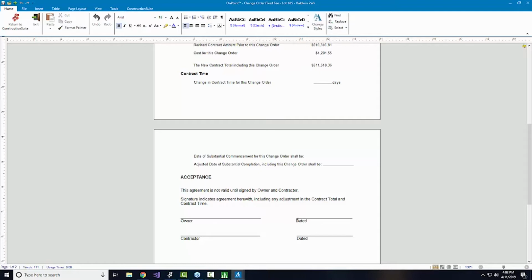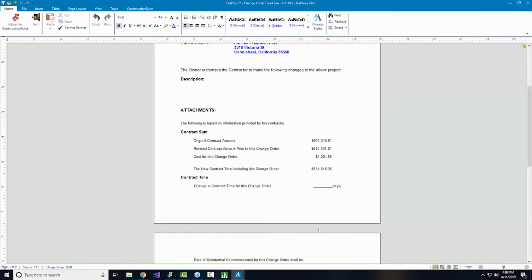That's right. Sometimes too, we'll see situations where the client's budget is okay. You've got a good starting point on the contract. We know maybe that's not even stretching the budget for the client, and there are real opportunities to be had there in some of those upgrades and change requests that may come along, but only if those things are documented. Just in working with a couple of you out there who've had situations where it didn't seem like it was a stretch for the budget, so like, sure, I know they're good for it, yeah, we'll go ahead and get the ball rolling on this, only to find that when the invoice came a month down the road, then there was a question, or I thought you said it was only this much. Those misunderstandings may be haggling, those misunderstandings may be genuine misunderstandings. It really doesn't matter. Having the documentation in place ahead of time is really the difference maker here between whether or not that's profitable for you.